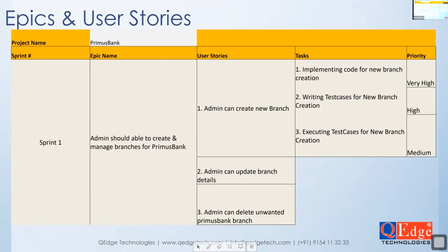One slide will explain to you the complete details about what an epic is, with an example. One epic will have multiple stories. One story will have multiple task items. These task items will be prioritized by the Scrum Master and assigned to the concerned team members by the Scrum Master in a Scrum meeting. Got it? Okay.